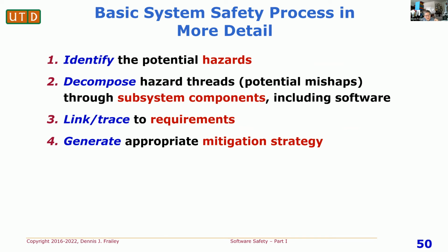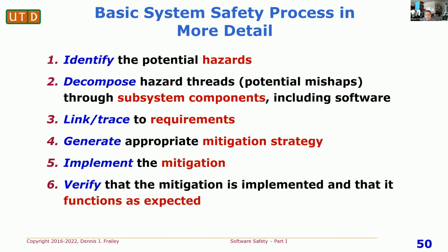Generate a mitigation strategy. Given what you're dealing with, you say, this is how we're going to do it. We're going to develop this part of the software extra carefully or some such thing like that. Implement that mitigation. In other words, do whatever you're supposed to do. And then verify that you did it correctly and it had the desired result.